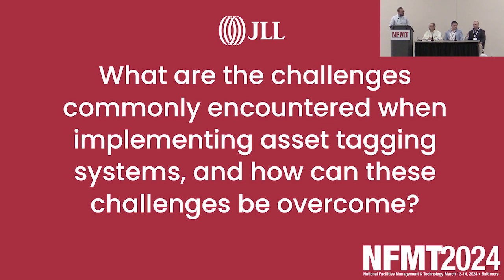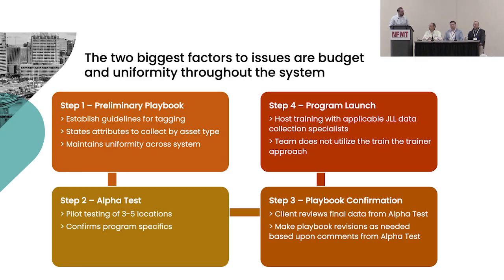I think there's two key things that become challenges until you've got deployment of a program. And those are really the execution, how you're going to perform that event, and the budget associated with that. And those are kind of two in the same types of issues, because typically when we provide a price to do something, we budget it based on labor rates and costs of sending our team or using local teams. But it's based on complexity of your real estate and the assets in those systems.